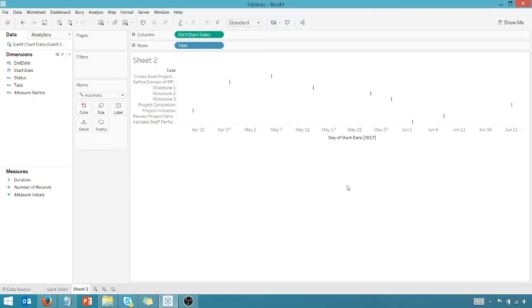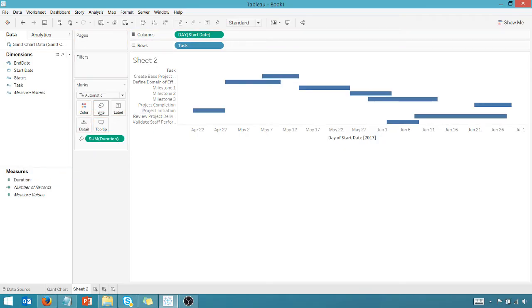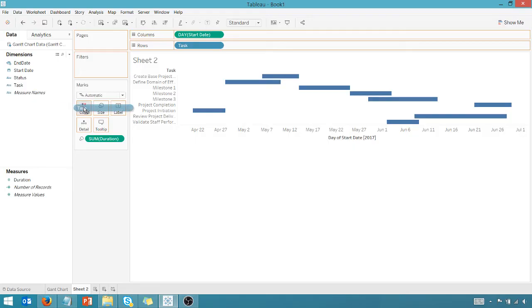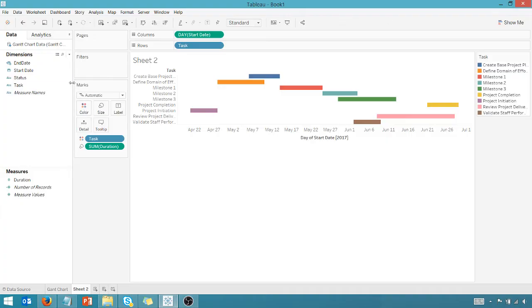And the next thing we can do, we can drag the duration in our measures to size. Gantt chart's starting to emerge just a little bit right there. If we want to, we can drag the task to color just to show the difference here in the task, highlight those differences. We may change this later, but that's something that we can do.